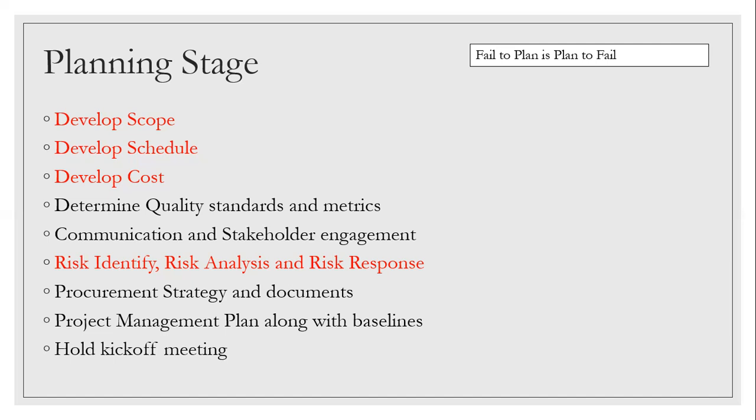Risk management is one of the core areas of PM. If you're not solid in risk management, you're not a solid PM. Risk management starts in the planning stage — some high-level risk was already bulleted in the project charter, but now you do identification, analysis, and response strategy, and develop the risk register. Procurement strategy must also be defined: what kind of procurement, what manpower, how many hours — finishing this in planning makes it easy to release purchase orders and get the job done.